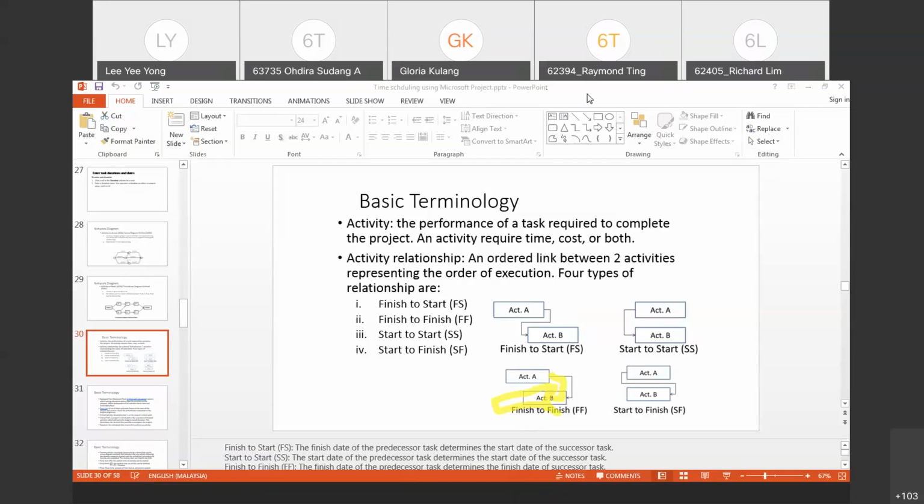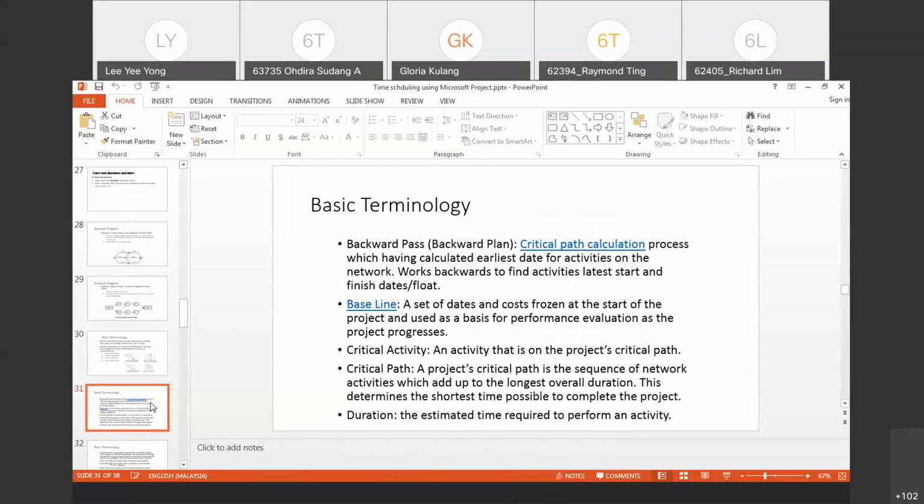Start to finish means that the homework starts when the reinforcement finishes. So this is start to finish. A very simple example, but it depends how you design. This example may not truly happen, but it is just an example. Most of the time, we will consider it as finish to start. Most of the sequence. But you need to remember it.